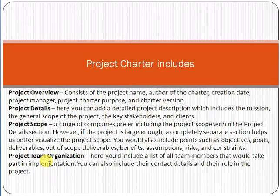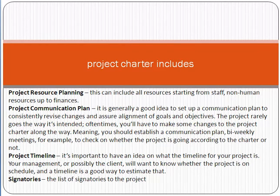The project charter also describes the team organizational structure — for example, CEO, CTO, PMO, functional management, and technical management. Resource planning is also included, covering which type of resources will be involved in the project, such as technical resources, functional resources, and database resources.